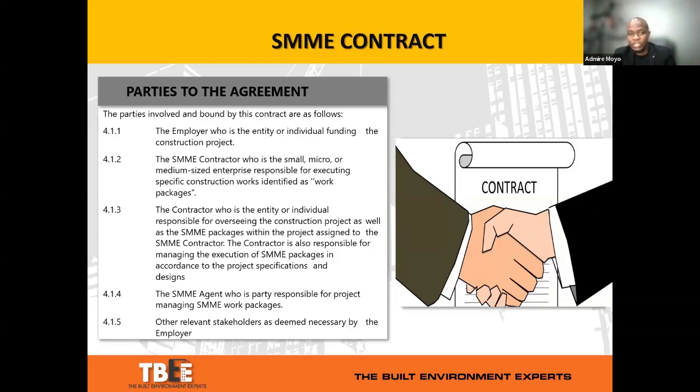And the agreement introduces what is called an SMME agent. Here the indication was to cover the gap where you've got a consultant team, a principal agent, and the design team, essentially your architect and your engineers, any one of whom could be playing the role of principal agent in any case. And you've got the quantity surveyor who also could be the principal agent.